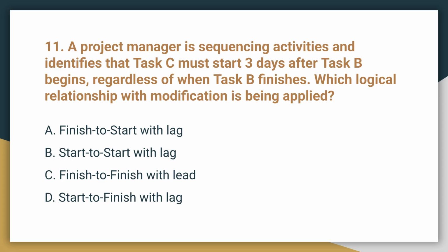Question 11. Task C must start 3 days after Task B begins, regardless of when Task B finishes. Which logical relationship with modification is being applied? The correct answer is B, start to start with lag. Lag introduces a forced delay between the starting points of two activities.